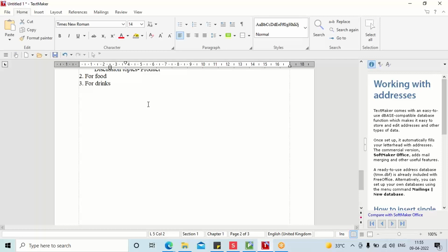Ma'am, after prioritizing the products, do we also prioritize the user stories in that product list? Yes, we should. That is what we do in a sprint planning meeting. We try to prioritize the user stories and think about which user story should come in sprint 1, which user story should go in sprint 2.